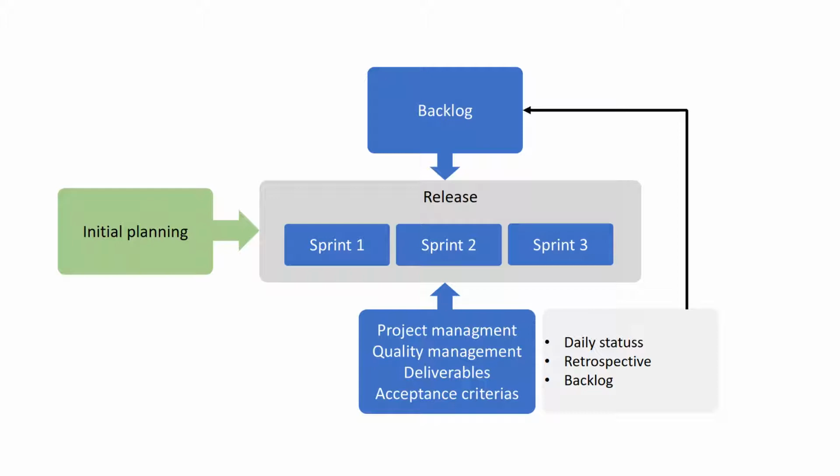A sprint could be a 1 week slot or a 2 week slot, or even a month if needed. But usually it works better if you use the same length for this period, like a 1 week sprint, and in each sprint you are delivering something from the backlog, and the whole team is working on it.